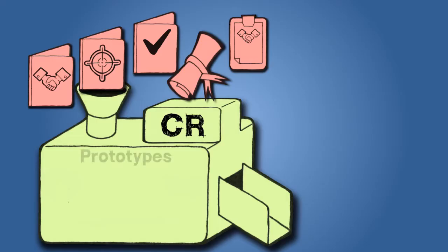She was creating prototypes. Making a prototype is a method of obtaining feedback on requirements by providing a working model of an expected product before actually building it. The advantage of this is that an idea becomes a tangible object and can be touched and used by the stakeholders, and it allows the project team to understand what works and what doesn't work.